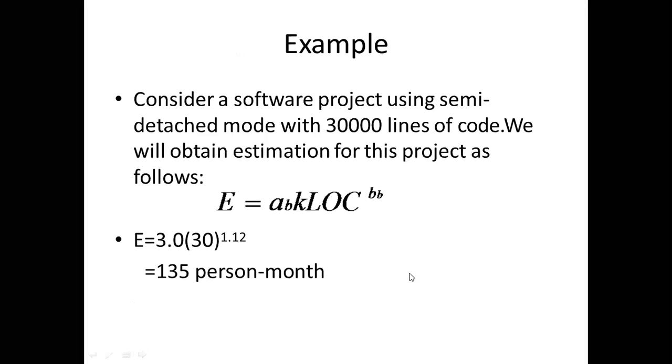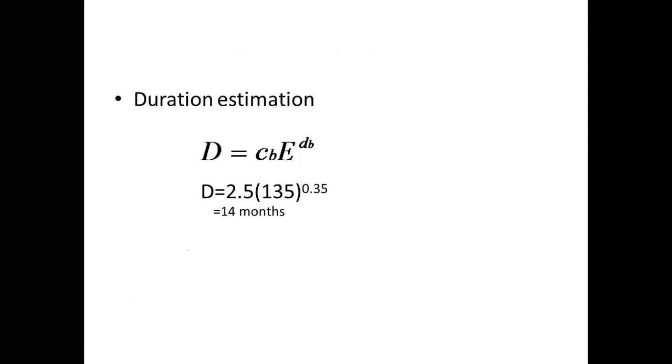For calculating development time, what we need to do is development formula लगा देंगे, but that will be 2.5 into 135 raised to power 0.35, that is 14 months. The duration will be 14 months. Always remember this is the estimate. We are calculating the estimate of effort, duration, time. Is that clear to everybody? Yes, ma'am.